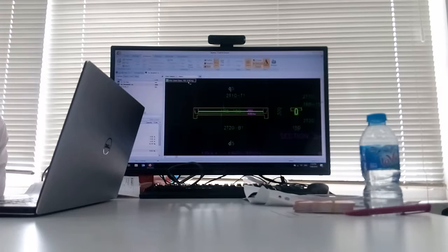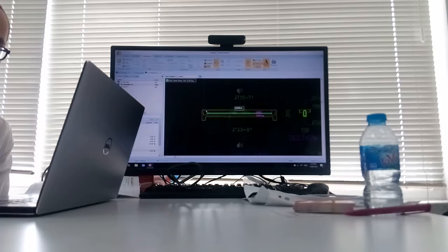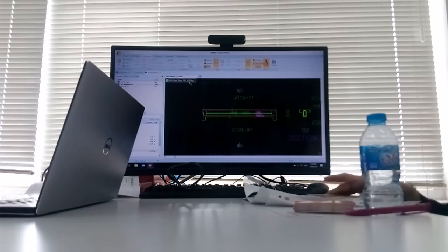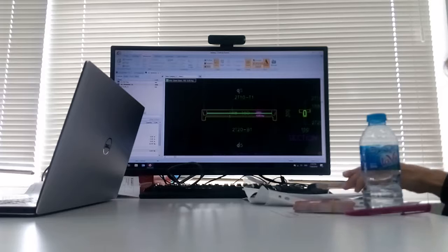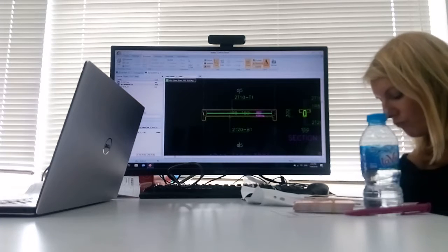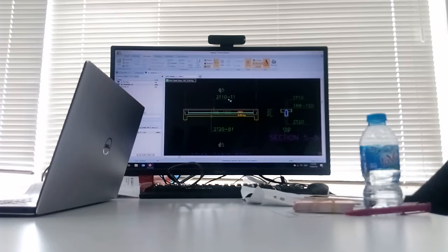6.6 kilograms directly. Based on the distance here, every 150 they will put in 1, and you can get the kilogram directly. So if you have a similar beam throughout the whole drawings, same thing, you can adjust the multiplier at the dimension tab here. You can double click, open this up, and there is a multiplier for you to adjust if you want to. Okay, this is for the rebar taking off.